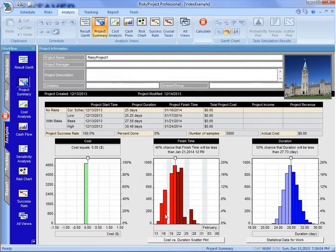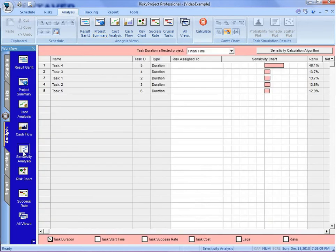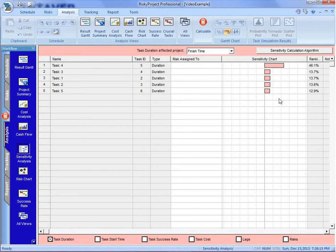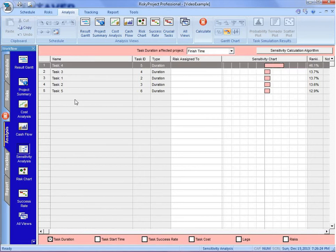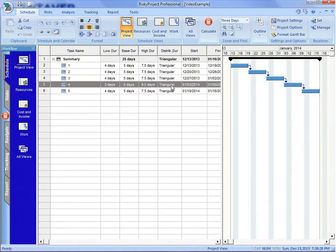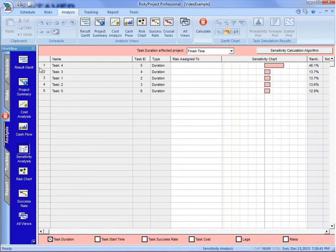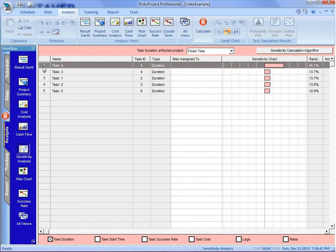I'm just going to click OK to cancel that. We're going to take a sensitivity analysis. What the sensitivity analysis is, you might have heard it as a tornado chart. What it does, it identifies for us what are the activities in the project that are driving the risk or the uncertainty in our project. We can see in this one, in task 4 here, that it has the most range from our base value, 3 to 9.5 instead of 4 and 7.5.